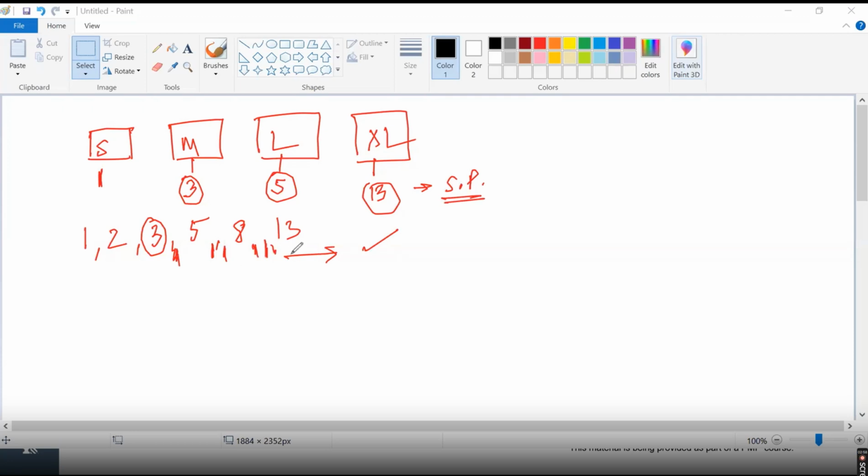And the meaning of each, when you say 1 story point, the value of a story point is equal to 4 hours worth of effort. The work will take roughly about 4 hours. So to complete 1 small user story, I will have to spend roughly about 4 hours. If medium is 3 story points, and I know each story point is about 4 hours, that means 12 hours of work will be required to complete 1 medium user story.